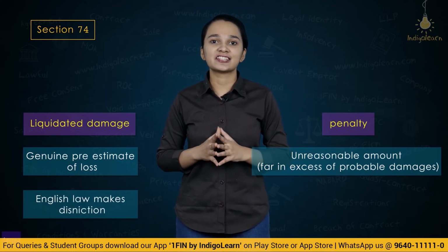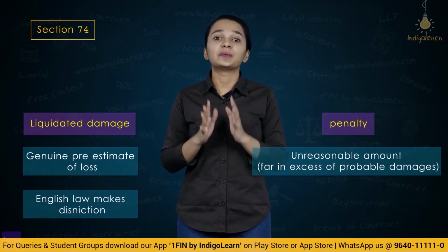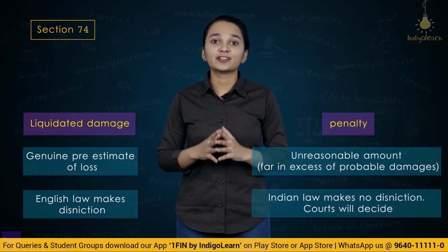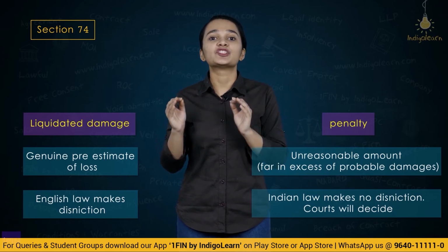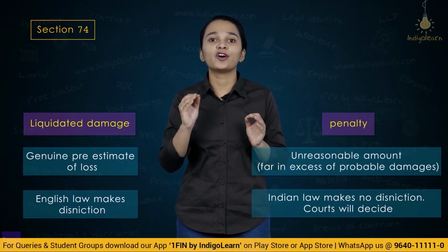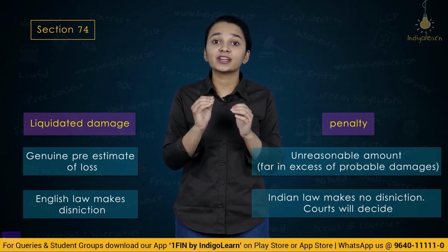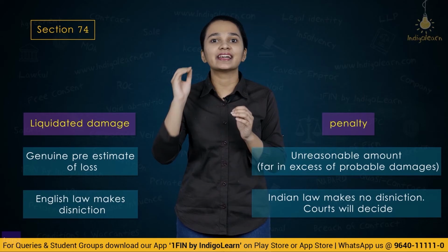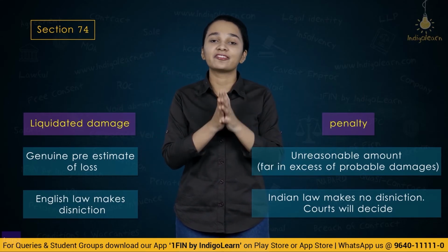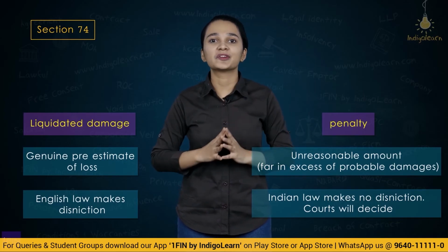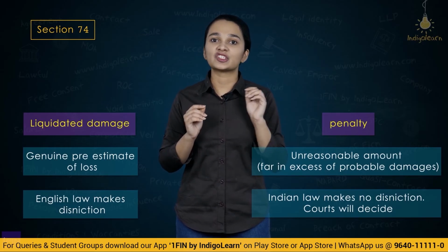English law creates a distinction between liquidated damages and penalty, but there is no such distinction made by Indian law. As in Indian law, it is the courts who decide what shall be the reasonable amount of compensation which shall be awarded for the loss which has happened. So it is the courts who will decide. Courts can never allow any amount which is higher than the amount which has been fixed in the contract, but yes, they can definitely allow a lesser amount as compensation. So this was with respect to liquidated damages and penalty.